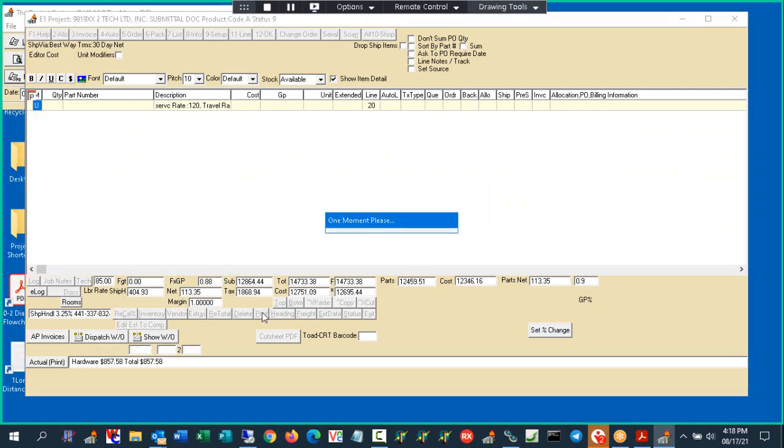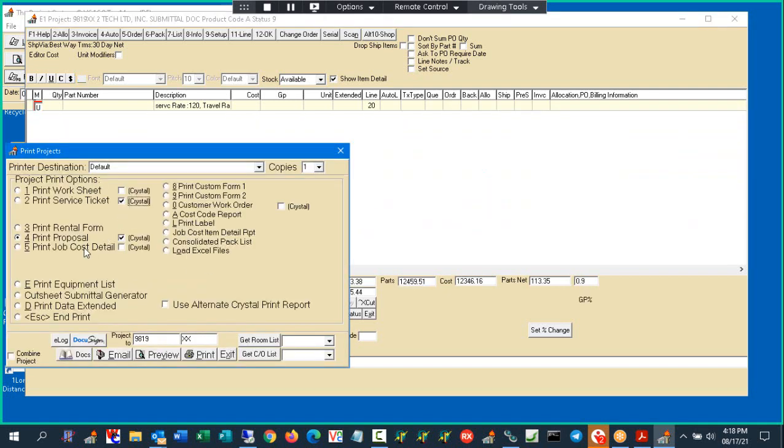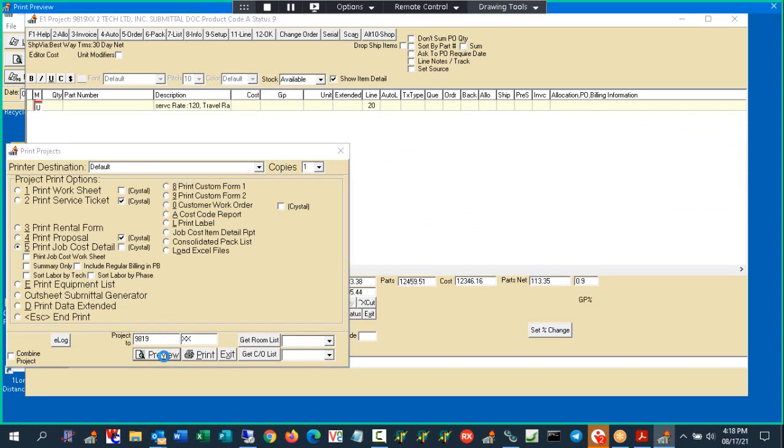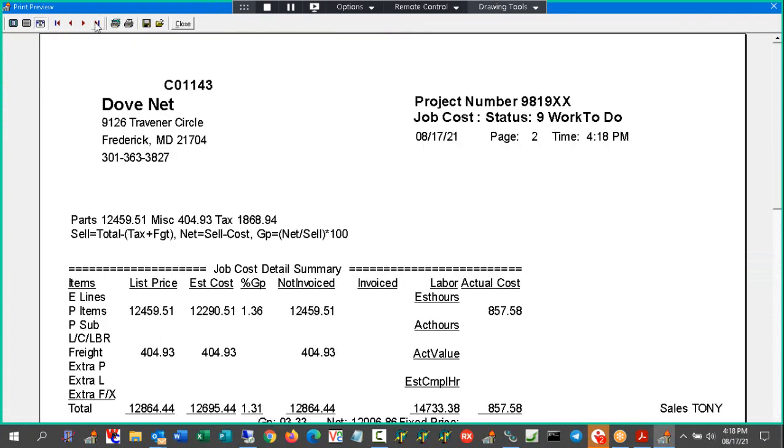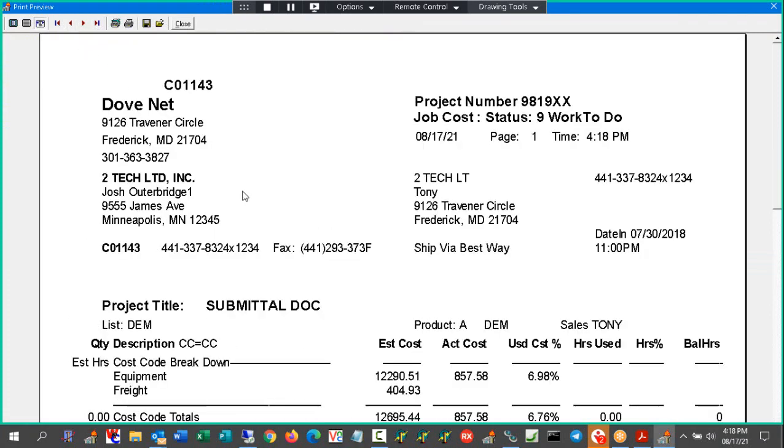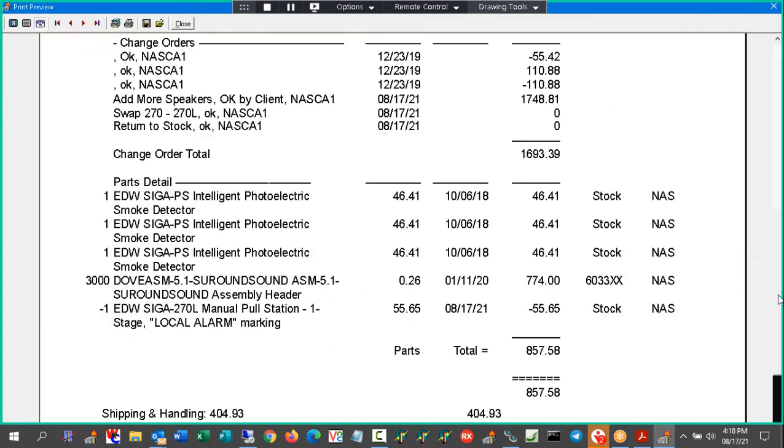But if you do them all within this one project, and you do change orders including credits, the job cost report is going to reflect everything. So it simplifies the whole job cost process because everything's going to be in this one job. Yes, it could be a terribly long job, but you'll see in this example there's your credit right there showing up.